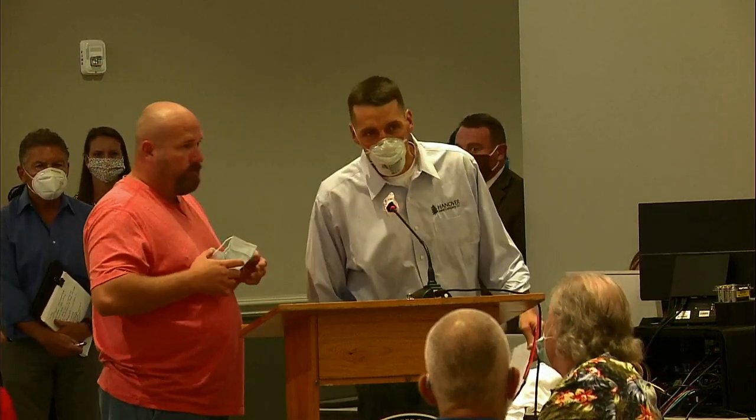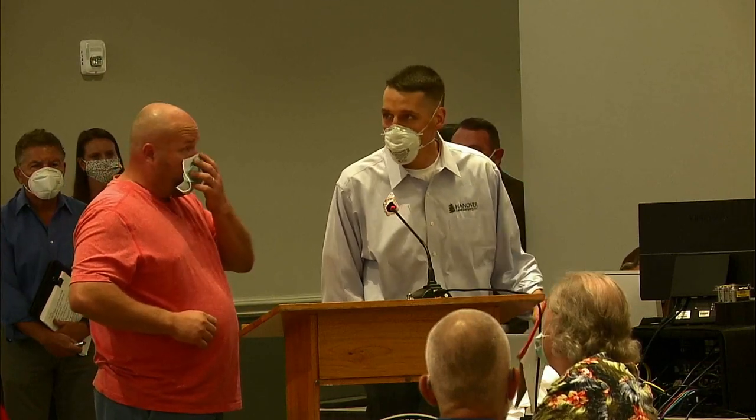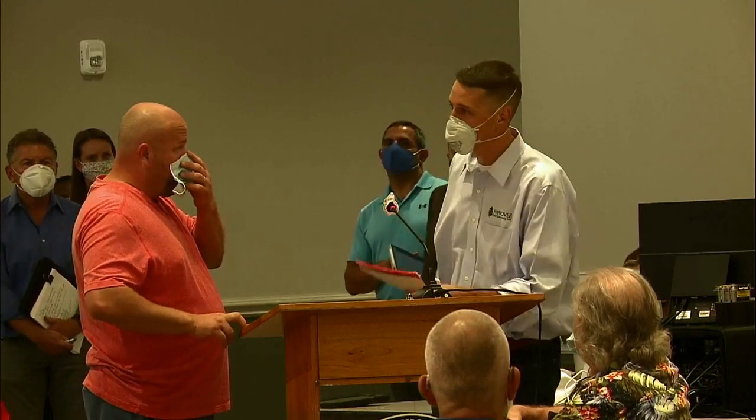That depends somewhat on market demand and absorption, but generally neighborhoods of this size absorb between 6 and 8 houses a month. So you project that out over the life of the project and you can do the math. Okay.